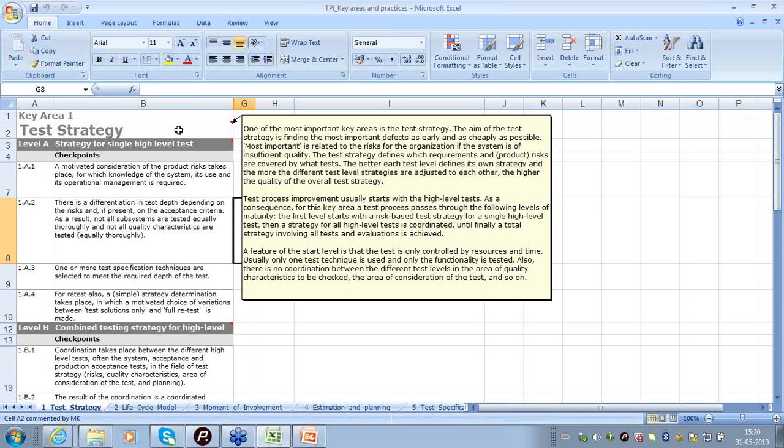So it says which requirements and which products are to be covered, how they are going to be covered, and how they are structured throughout the project schedule, which means which testing will be done first, which testing will be done second, how much effort will be spent on a particular phase of testing, which is all based on the risk associated with the different features of the software.